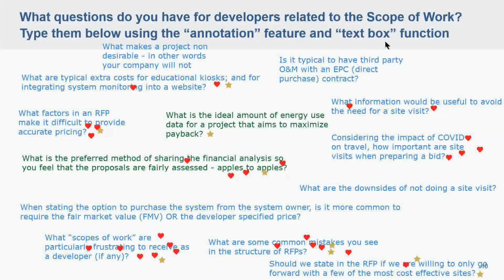And then from a good project scenario, things like, have you identified a good host site? If it's a roof, what's the roof age? Looking at the load that you have, making sure there are tons of interconnection points versus one, understanding the deal structure within that specific utility. We'll definitely have channel partners, which are the developers for us, who will look at a project and say, I just don't even want to touch that utility, or it's a nightmare to deal with that building permit department. So definitely, there's a lot of things that go into the good project piece.